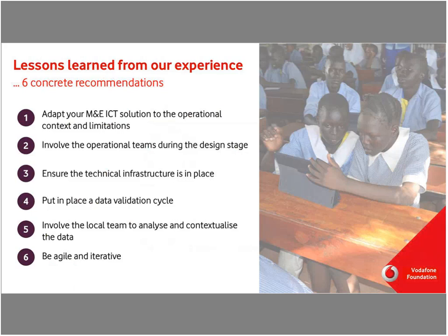To give you an example, in a school, in theory, we have internet access. But we acknowledge that we could have a breakdown of internet at some point. So the solution we designed and the mobile app we're using is effectively working in offline context as well as online. So having solutions and plans for backup is always important.